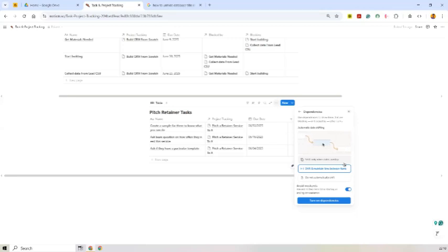If you shift anyone, the number of days you shift, forward or backward, is going to affect the first task and the last task. So that is how this works. If you click on do not automatically shift, it will not shift anything, it will just leave it the way it is. So you get me? I want to leave it as this because we are doing freestyle for now.